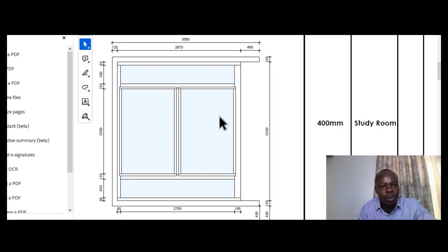But then in your description, to be more precise, you need to describe the sizes of these panes in stages of 0.5 square meters. So I just want to show you how that 0.5 comes along, or what it means in a real sense. I just want to show you a simple calculation in Excel, so that you see how we calculate that, and then we determine in which stage we categorize these particular panes.